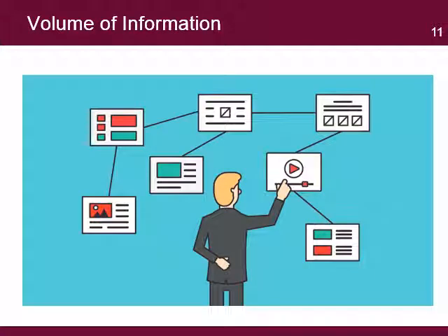A simple rule of thumb is to keep it simple and identify only the information that will be used. The project manager should ask if the information collected has ever been used to make decisions that improve the project. If the information collected was never used, then the project needs to consider the value of the information and could decide to stop collecting it.